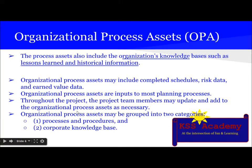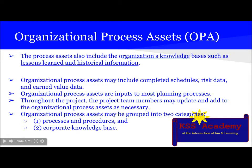Organizational Process Assets may be grouped into two categories: Processes and Procedures, and Corporate Knowledge Base. Under Processes and Procedures, we include processes, policies, safety, health, ethics, financial controls, change control, risk and time management, templates, guidelines, closure procedures, and communication. Under Corporate Knowledge Base, we include databases such as measurements, defects, and financials, as well as historical information, lessons learned, and project files.